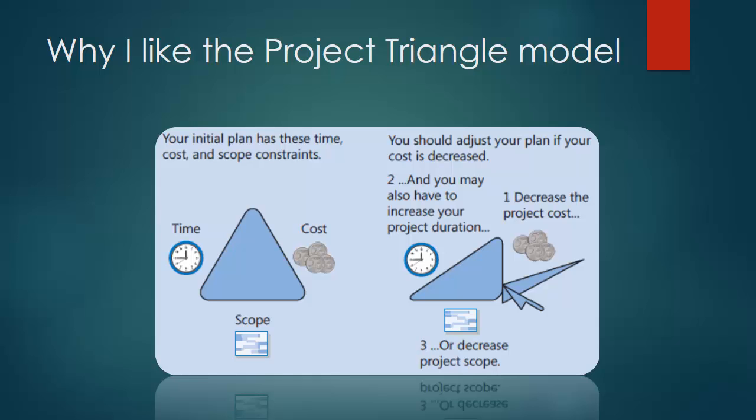You made some initial assumptions about capabilities of your resource, who's going to do certain types of work. Plans changed. The people who will really do that work may not be as capable, or they may not be geographically located with the rest of the team, so there's a lag due to distances and so on. This is actually a very common issue, in particular with knowledge worker teams where team composition can be extremely volatile as the project progresses.